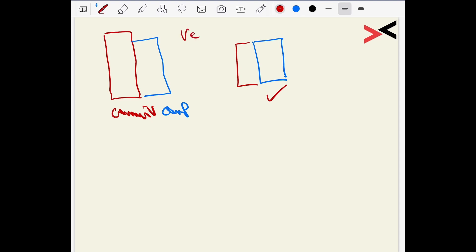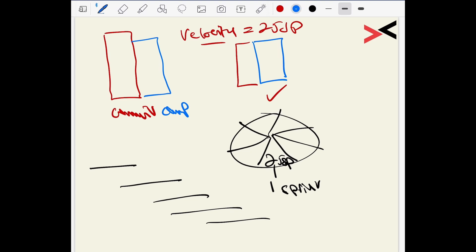So once you understand the velocity, the number of story points that they finish within a sprint, you'll be able to say that if the velocity was say 25 story points, then you can see that if I had a pie, I would cut out that many slices of 25 story points. So then you can see that if this equals one sprint, then I can map out how many sprints I would need to complete the whole project. This would also give me the timelines for the management to see that if this is sprint one, and then two, three, four, five, it'll take this long, say from January to June. The velocity will also help how efficient the team is to make it go faster. Obviously, you need to increase the velocity from 25 to say 50, so you take more stories to be worked on.